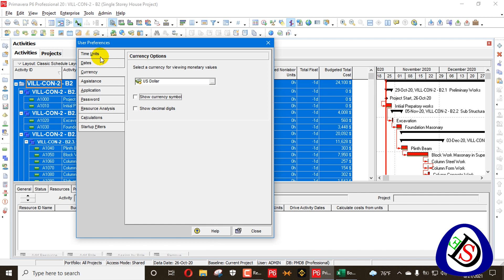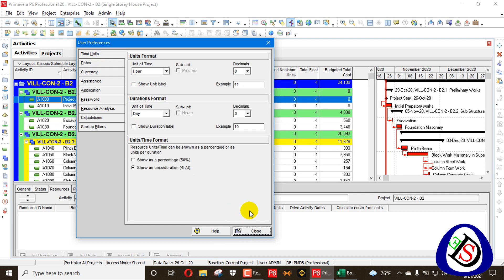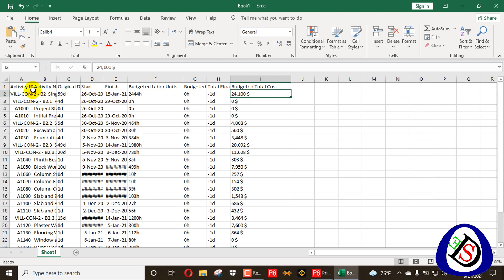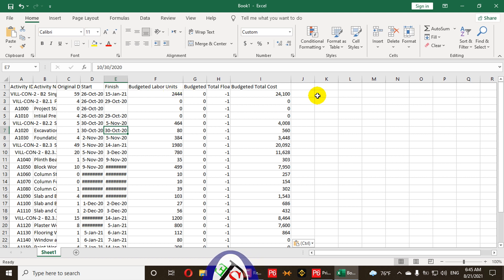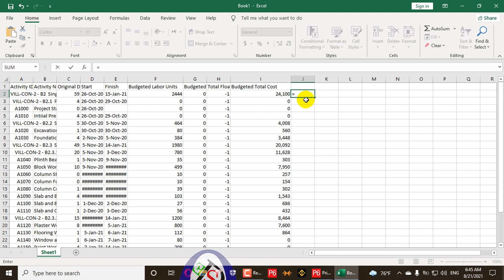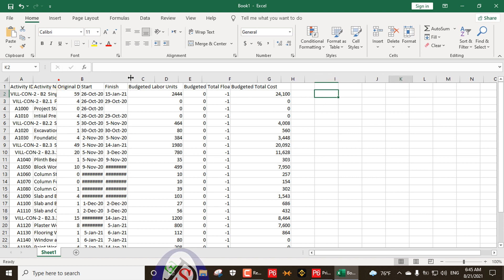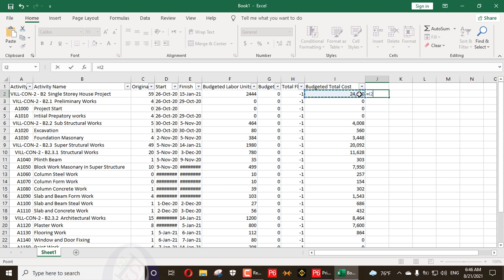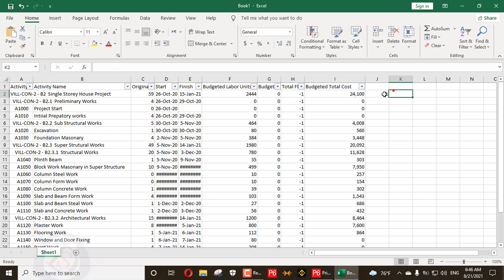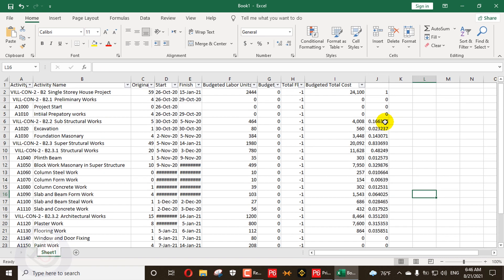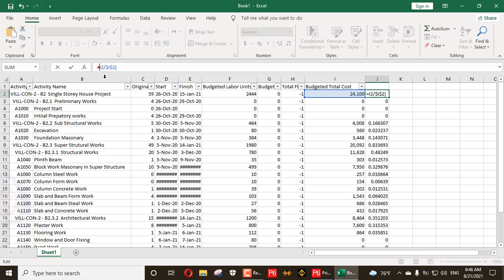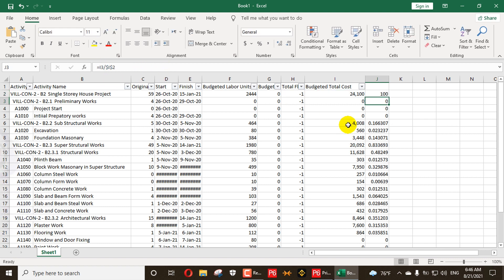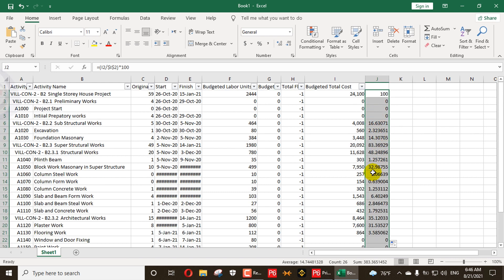If you want to remove the currency sign, you can do it from there so it will not appear. You can also use the units column. I'll go here, and these are the WBS columns. I'll add a filter here. This one is my total sum-up — I'll set it equal to this value divided by the total, make a dollar sign with it so that dollar sign applies until the last row.